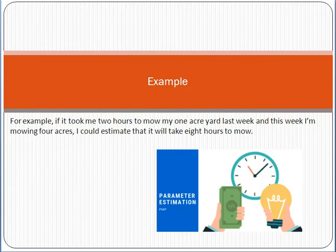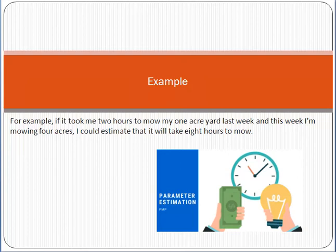For example, it took me two hours to mow my one-acre yard last week, and this week I am mowing four acres. So, 2 multiplied by 4 equals 8 hours. The unit is: for 1 acre, 2 hours are required. So for 4 acres, 8 hours will be required. This is the concept of parametric estimation.